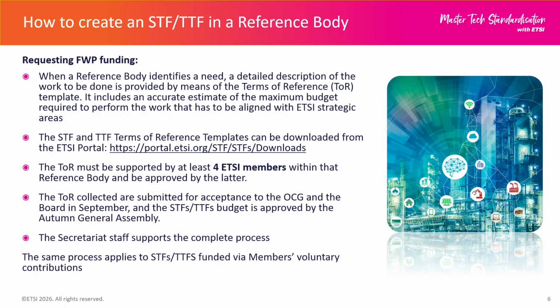So, how do you create an STF or TTF within a reference body using the funded work programme? Well, it begins when a need is identified within a reference body. At that point, a request is developed together with a set of terms of reference, or TOR. These terms of reference provide a detailed description of the work to be carried out, including a clear estimate of the maximum budget required.